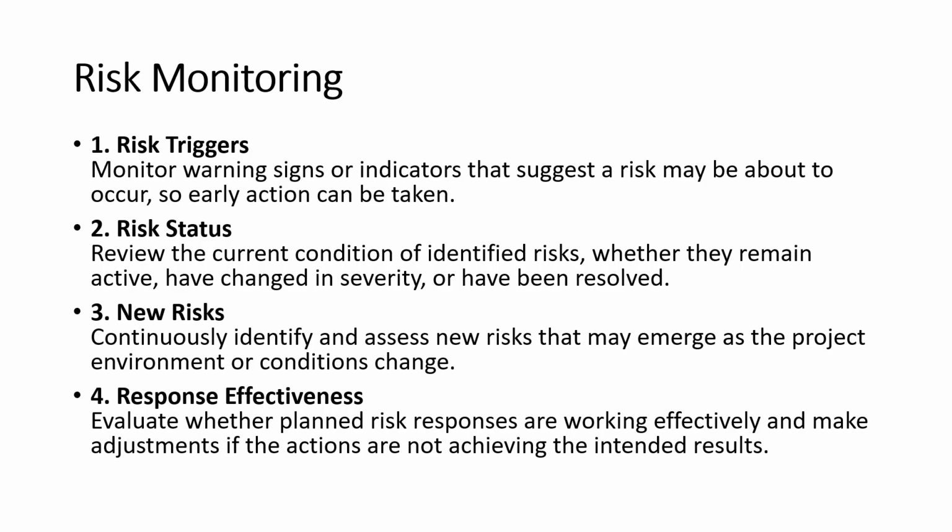The first thing we monitor is risk triggers. These are warning signs or indicators that suggest a risk may be about to occur. By watching for these signals, the project team can take early action before the risk develops into a bigger problem.